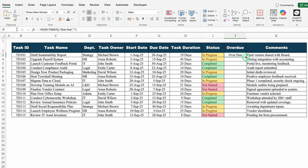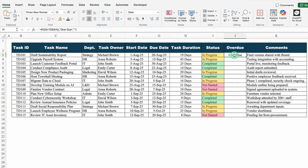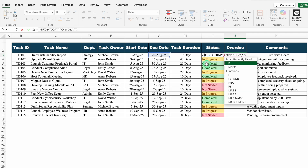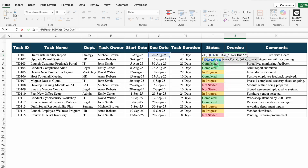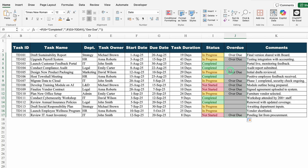We got 'overdue'. What will happen if I drag this down? If the task is completed, then also I can see 'overdue'. I will undo this. We will double click on the formula and come to the very beginning. We will insert one more criteria of IF — if the status is equal to 'completed', double inverted comma completed double inverted comma close, comma. If the status is completed, in that case I want the cell to be blank — double inverted commas twice, comma. We will come to the end, close the bracket, and hit enter. Now I will drag this down, and for status which is 'in progress' or 'not started' we can see 'overdue'.